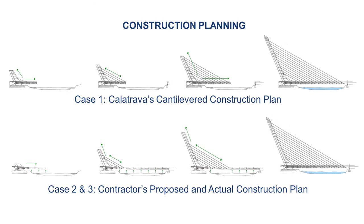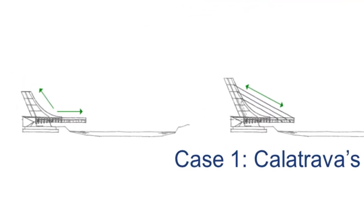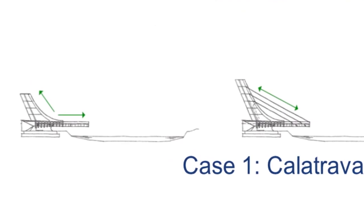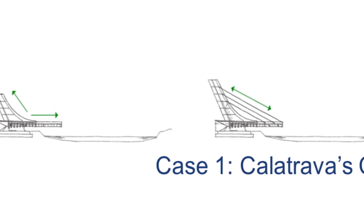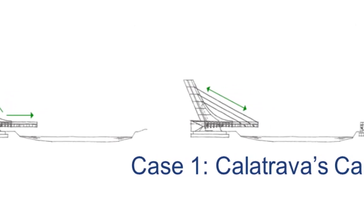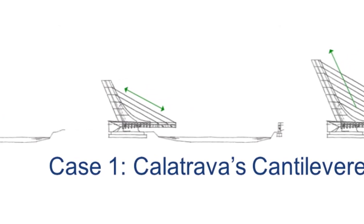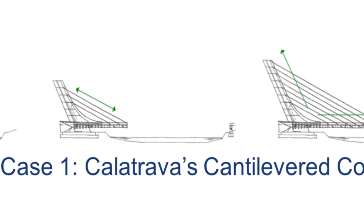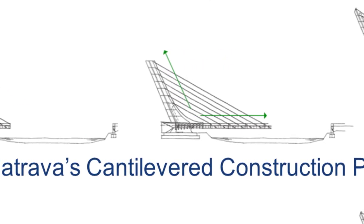There were three construction plans for the Alamillo Bridge. The first plan, Case 1, was Calatrava's original construction plan and also became part of the bidding documents. According to the bidding documents, the steel box girder would be prefabricated in 12-meter segments, with each segment transported and welded as a cantilever in front of the previously placed segment. Then three pairs of steel wings would be welded on each side, precast slabs placed as formwork for a cast-in-place slab, and the resulting 12-meter deck segment supported by a pair of cable stays connected to the pylon.